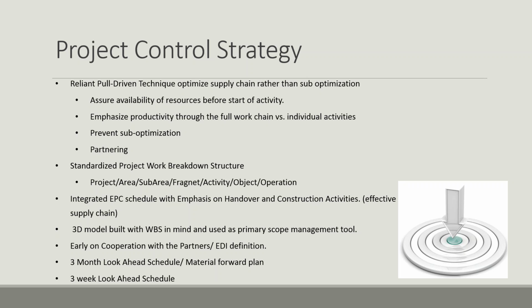We emphasize a 3D built model, so we use 4D and 5D. The model itself reflects the work breakdown structure so that it's easy to subdivide the sections and be able to give people work packages. We always work with our partners, and especially we emphasize the electronic data interface so that we get the data as we want it and the 3D model, and we do clash checking, and we are able to manage the construction using models supplied by our subcontractors.